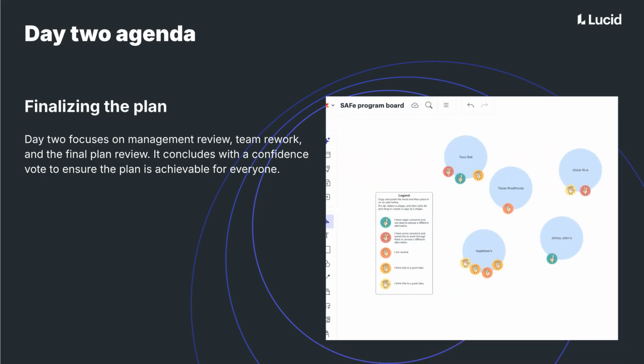On Day 2, management addresses issues from the draft plans. Teams refine their work, present final plans, and hold a confidence vote to commit to the increment.